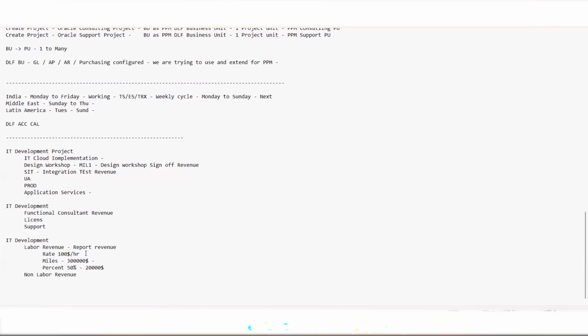So percent complete and milestone, right? I gave you an example. Your project starts, and you are writing the functional design document, let's say. The agreement with your customer is that once the functional design document completes, you will have $10,000 in your pocket, or the customer will release $10,000. So at that point in time, you generated a revenue event.